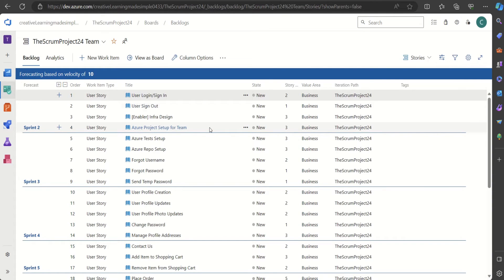We've set Parents off and enabled forecasting. By default it says 'forecasting based on velocity of 10'. Velocity is essentially the average amount of work a team can finish in a given iteration. If our team's velocity is 10, that means they can complete 10 story points of work on an average sprint.